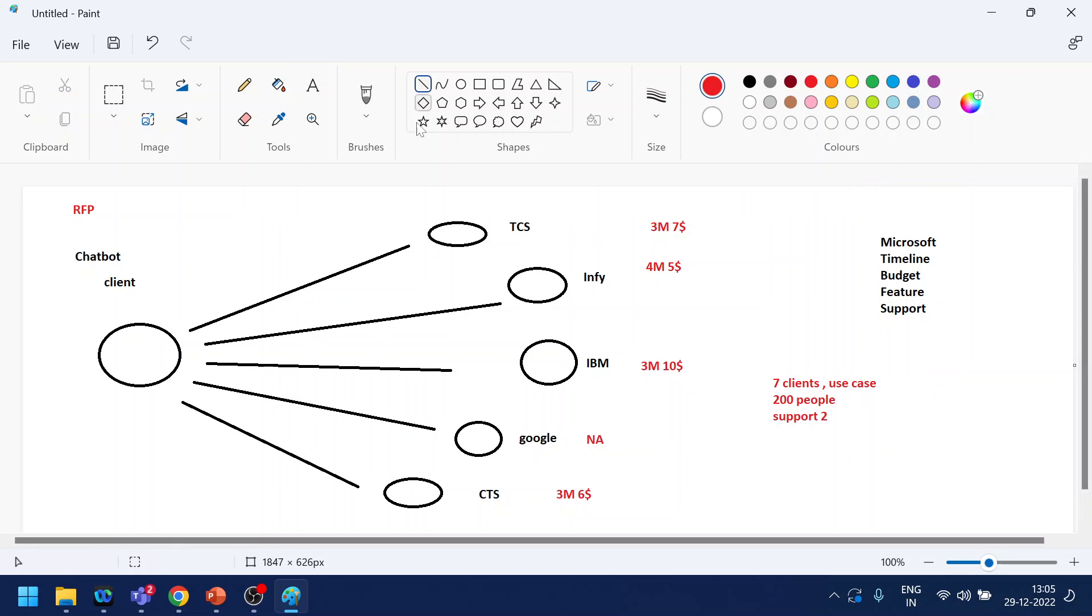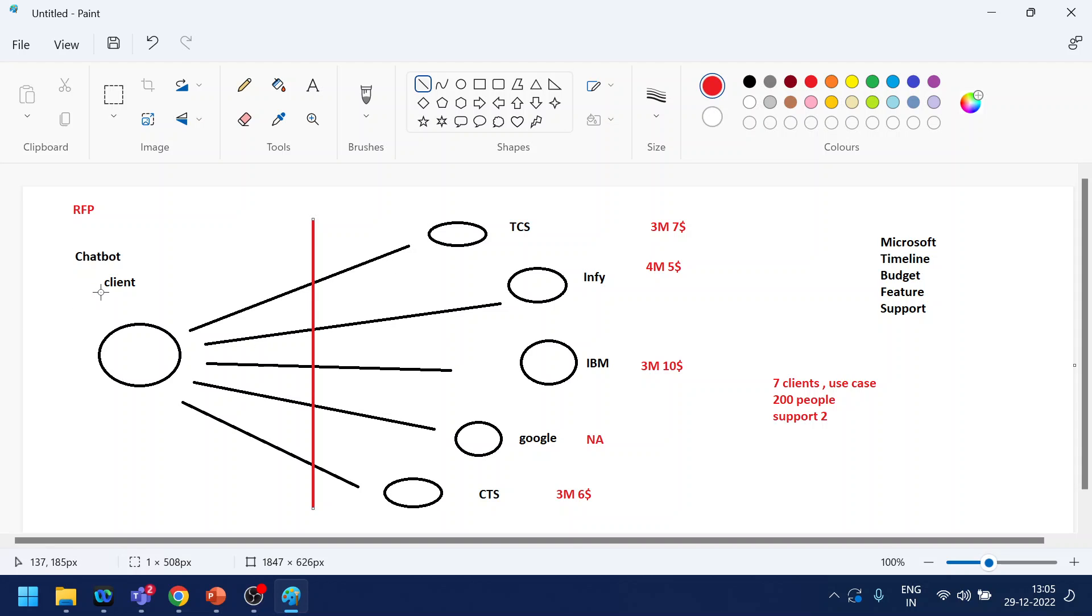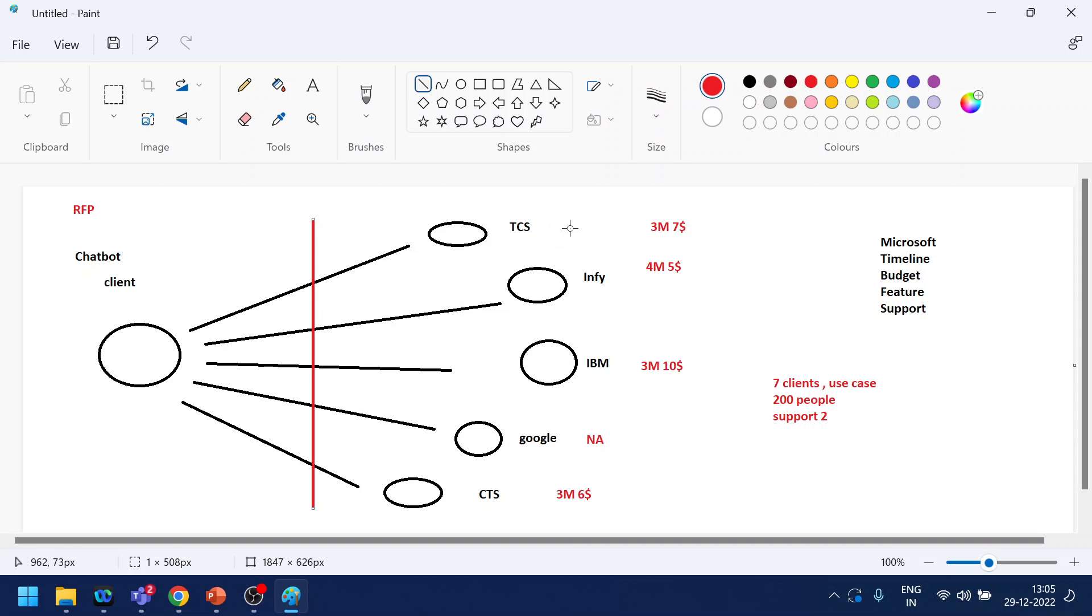So in a nutshell, this is what we call as RFP where the client shares the requirement with the industries. It can be a product or it can be a service based on the requirement from the client side. It can be a direct product buy, like when a particular company wants to buy laptops for their employees, so they go to different companies like Dell, HP, Lenovo, all these things, and they get the quotation back, like what are the features of the laptop and how much it will cost if you buy 100 or 200 laptops at a time. So that is what RFP is.